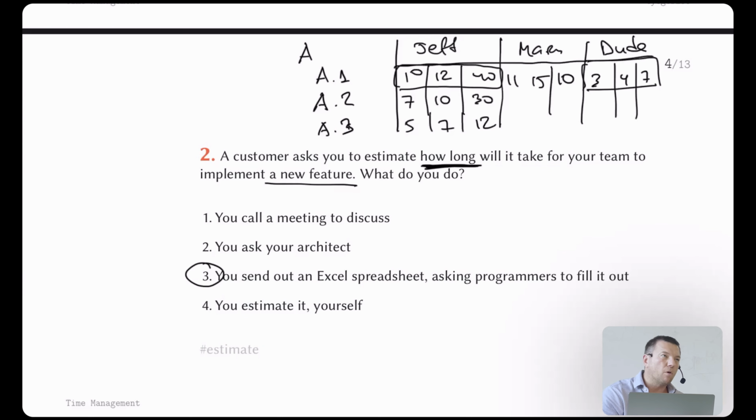In this case, they probably didn't understand well what A1 is. Because this person gives me the result will be somewhere around 25 maybe, and here we have maybe 4.5. Between 25 and 4.5, it's a huge distance. It means a misunderstanding of the scope in most cases. Or maybe they're completely different in skills. One of them is a Java programmer, another is a DevOps expert, so they have no idea what Java programming is, for example. In this case, the DevOps person just gives the number randomly.